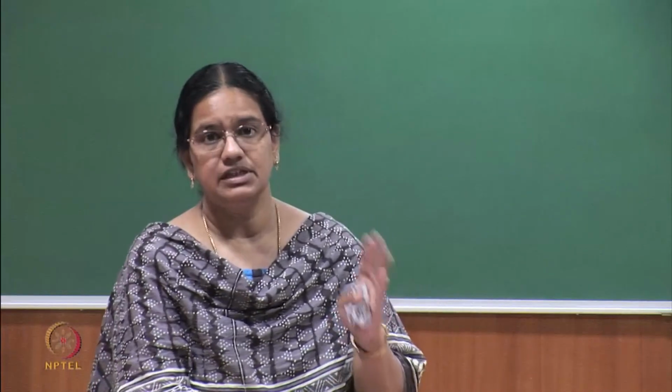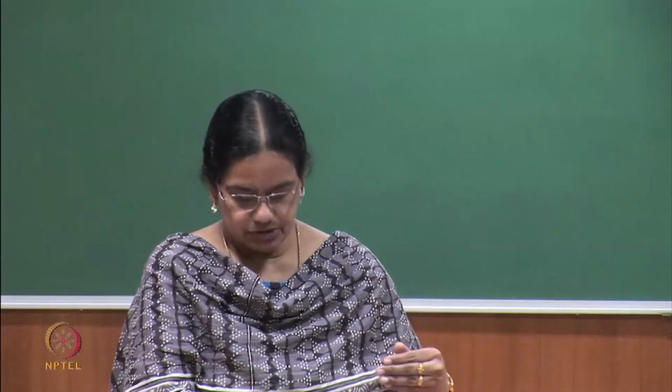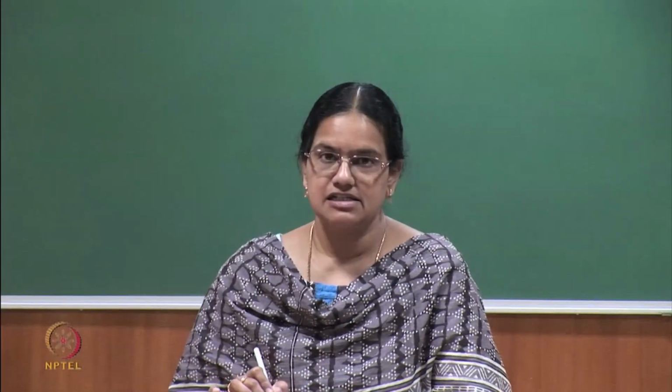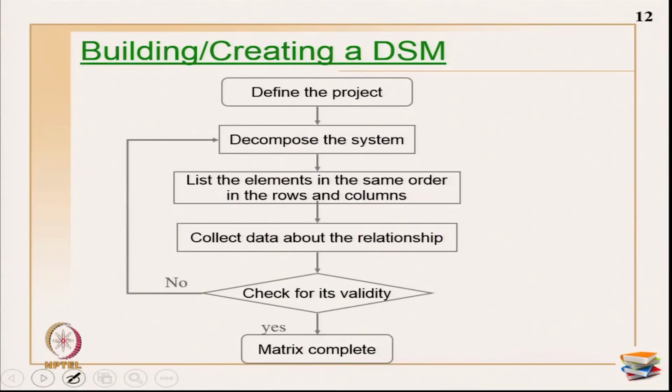So, so far we started with defining the scope of the project, then decomposing the project, where I have shown you the levels, teams, components, then the activity list, and then the variable DSMs, or the other name I can say is a DMM, which is a domain mapping matrix, and I am having 2 rectangular matrices. Then you have to multiply, if you want to do it mechanically, or you can go through the logic also, I have explained you that. You do that and then you get this matrix, convert it into X marks so that you will get the activity DSM. Okay. So, which is what I have shown.